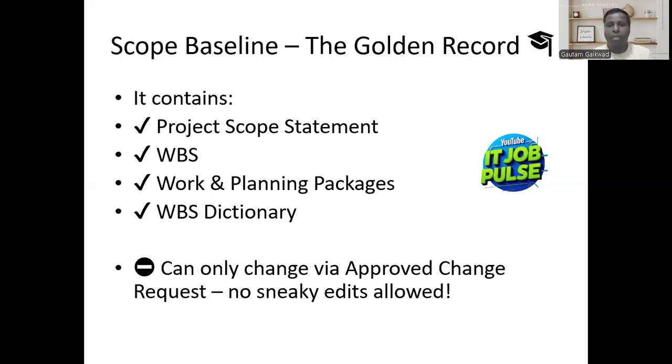I am a project manager, so what I will do is say to the stakeholder, boss, I got your requirements and I understand that this is a really important functionality which we should add into the e-commerce application, and that is a valid requirement. Let me go back and check the scope. Okay, I am sure that it is not part of the scope. Now, if we have to change the scope, I find it a little challenging because it should go through the approved change request.